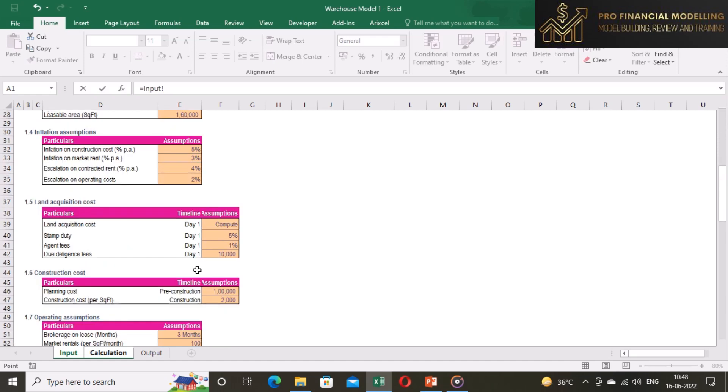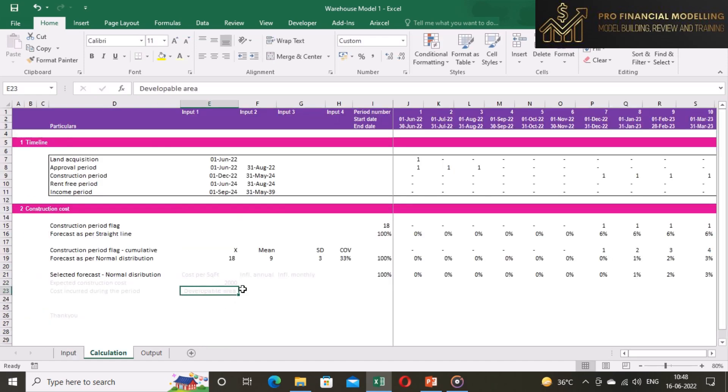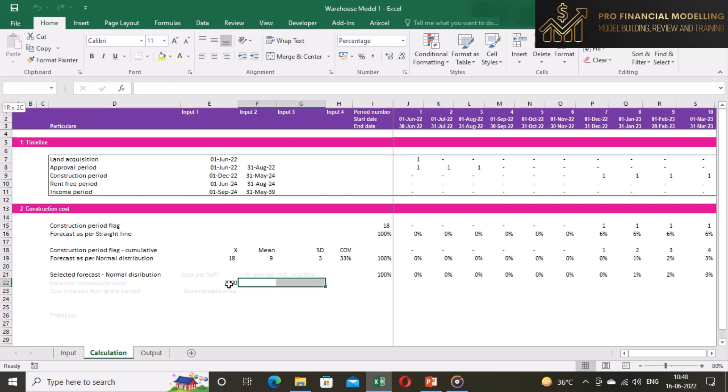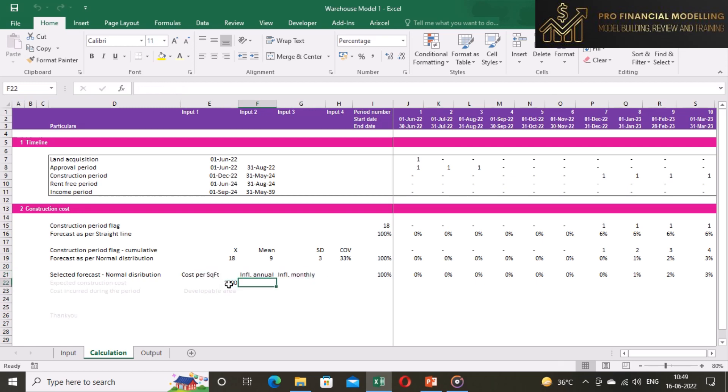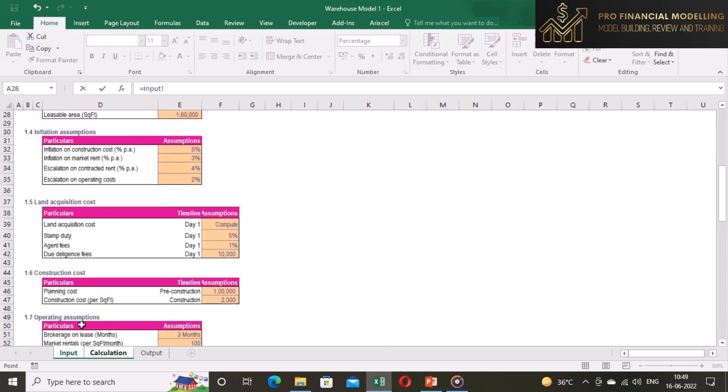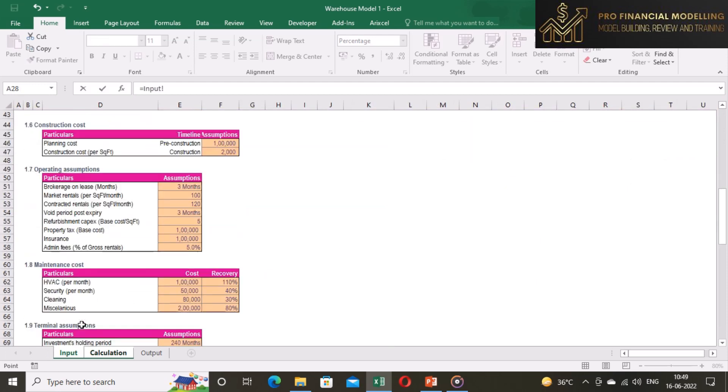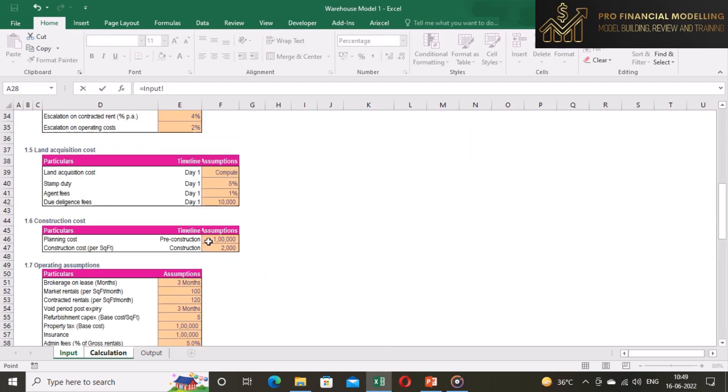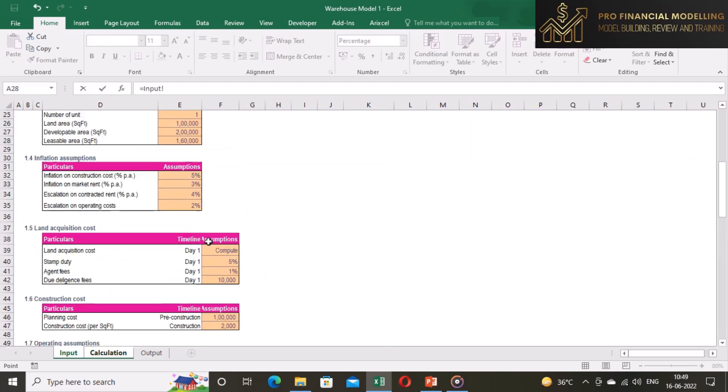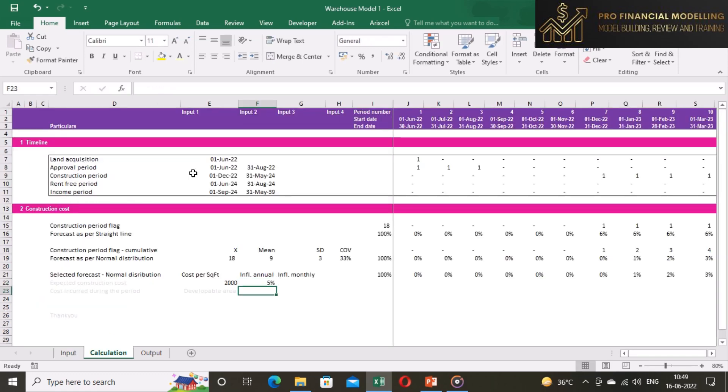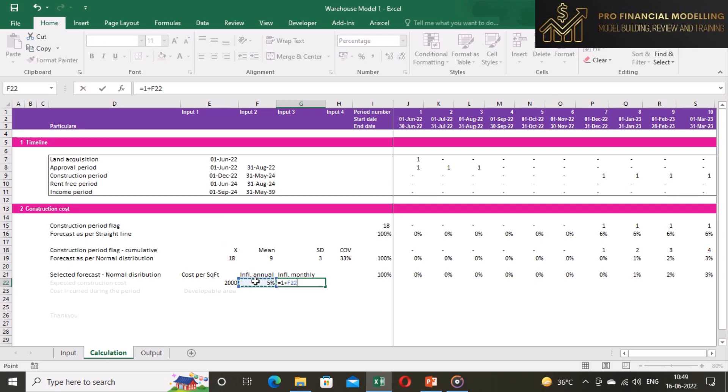Let's compute our construction costs estimate during the period. Construction cost as of today is 2000 per square feet of developable area, which will be our input one. And inflation on construction cost is 5% per year. This will be our input two. From our input two we will compute the inflation per month as input three.